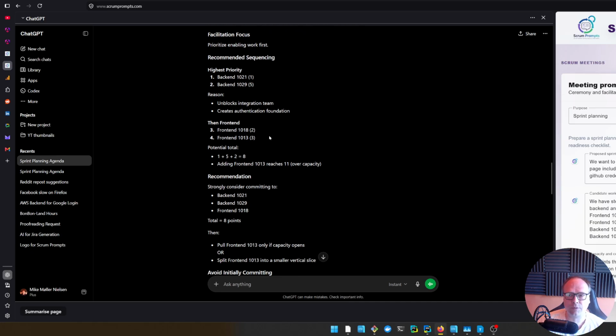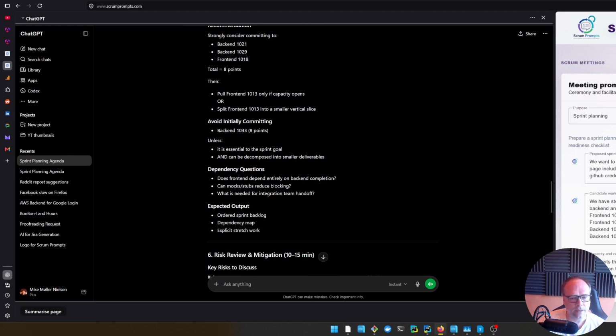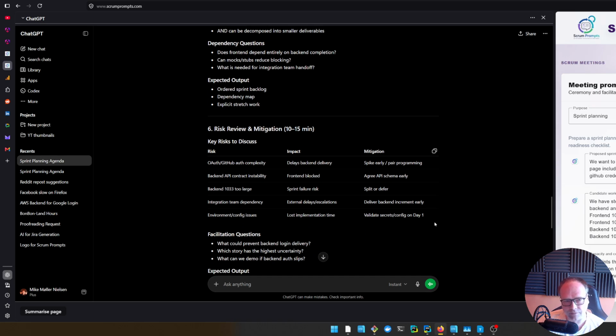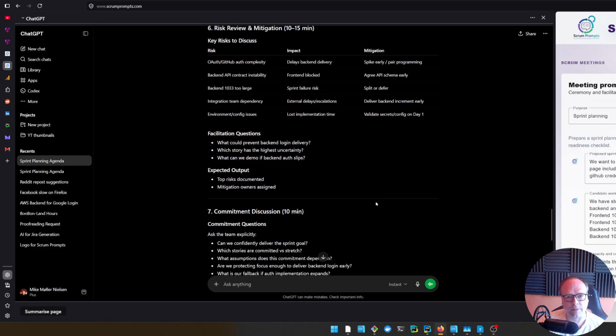Usually in the sprint planning, you would not put on names on who actually does what, but in the sprint simulation, you would simulate who does what and when, and then you can see if there are some hidden dependencies that you did not see before, and maybe you can see that you're a bit optimistic already. So it's just good as a tool for discussion.